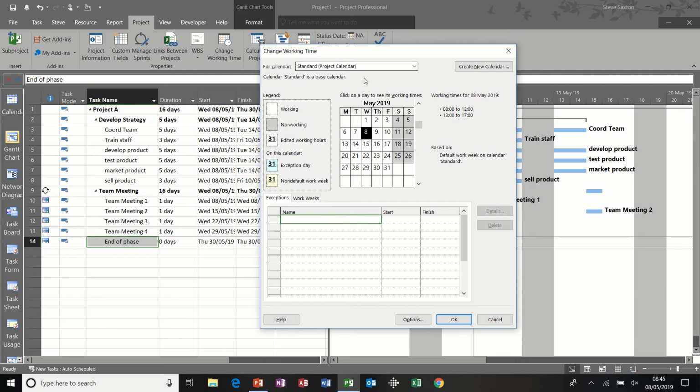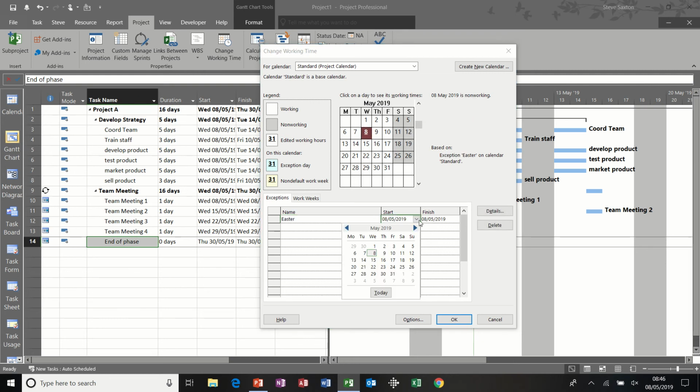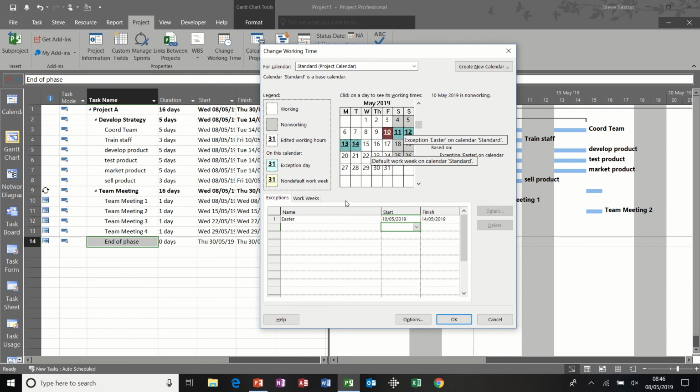So what you put in the project calendar are things like holiday shutdowns, factory shutdowns, bank holidays would go here, exceptions, and things like that. So if I put, for example, Easter, we've had Easter, but let's just say pretend it hasn't happened. So let's say Easter is there, Good Friday, so that there is now shaded out as a non-working time. So that would cascade through everybody else's projects. If you had somebody working over Easter, you would edit their project to allow them to work.